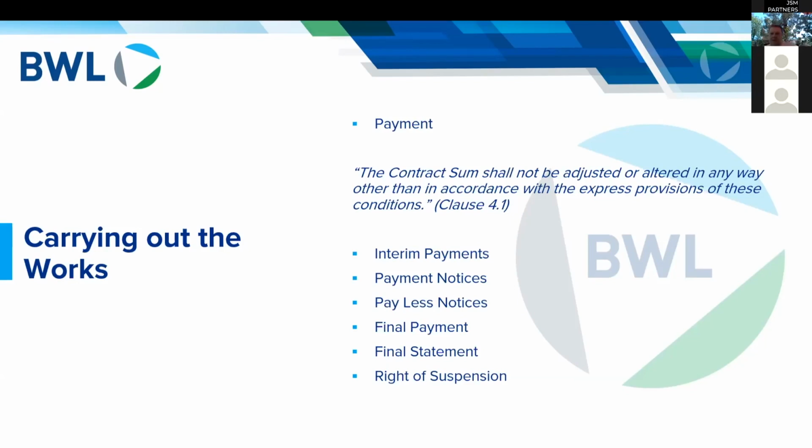So you make your application, and whilst the project is between the commencement date and the date of practical completion, which is something I'll talk about in a second, your applications are interim payment applications, as opposed to the final application, which comes at the end. Now, the contract, and the JCT contract is relatively good at this, sets out pretty closely to the legislation how the payment process is to be carried out.